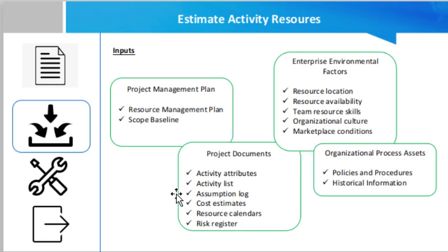The activity list identifies the activities that will need resources. The assumption log may have information on productivity factors, availability, cost estimates, and approaches to work that will influence the nature and number of team and physical resources. Cost estimates — the cost of resources may impact resource selection from quantity and skill level perspectives.